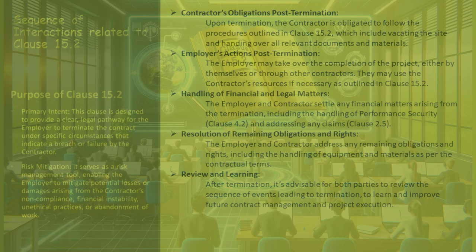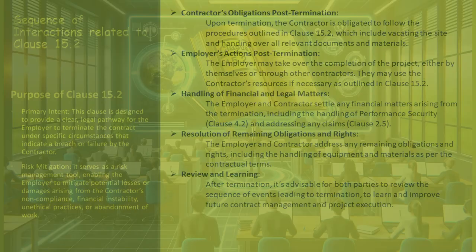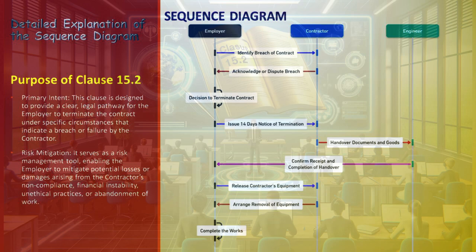The employer and contractor address any residual obligations and rights, including the disposition of equipment and materials as per the contract. After the termination, it is beneficial for both parties to review the events leading to the termination to glean lessons for future contract management and project execution. This detailed sequence outlines the structured approach required for the effective implementation of Clause 15.2, ensuring a fair and legally compliant process. The sequence diagram begins with the employer recognizing a breach of contract by the contractor, ranging from non-compliance with performance security to failing to progress with the works.